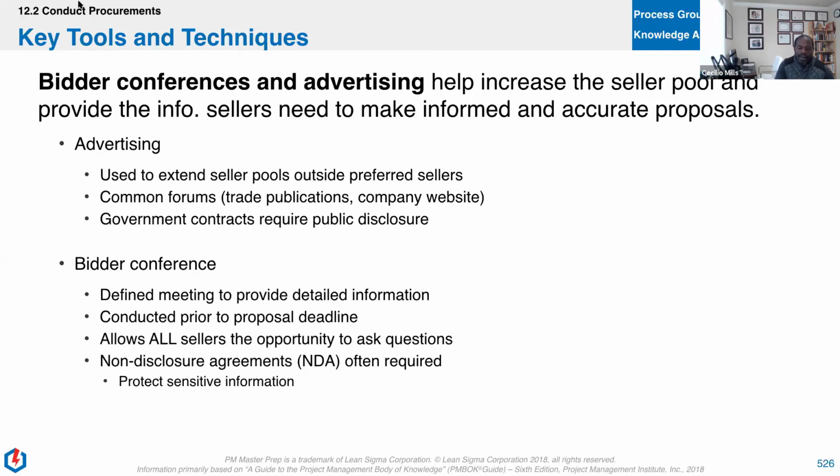And the idea is a couple things. It'll save me time. If 15 people emailed or called me about the same question, I don't have to answer it all the time. I can just answer it once and everybody gets it. It also minimizes the chance that somebody might say, hey, you gave this person all this extra information about how to best create a proposal, and you didn't tell me. You're showing favoritism. You really just want to hire that vendor. It reduces my liability of being sued for that.